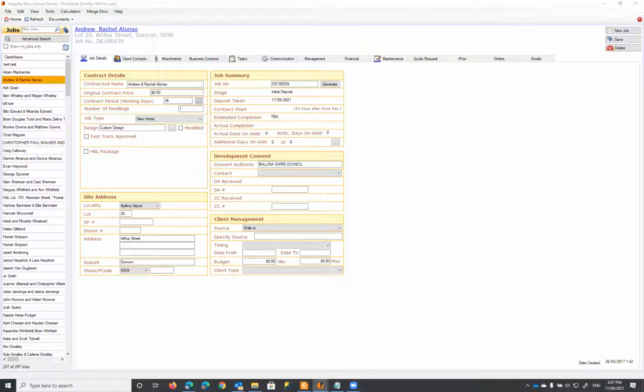Cheers, guys. I was just going to say that the order of the contracts ordered and contract drawings tasks is probably a little bit about face. The contracts ordered task is ticked after the contract administrator has finalized the Addendum A, which is done after the plans are complete. So proceed to contract gets done, the plans get done, and then the contract administrator takes the latest sales estimate and the latest set of plans, compares the two, writes the Addendum A by inserting all of the relevant disclaimers, finalizes the Addendum A, confirms the final price with the salesperson, and then they tick contracts ordered.